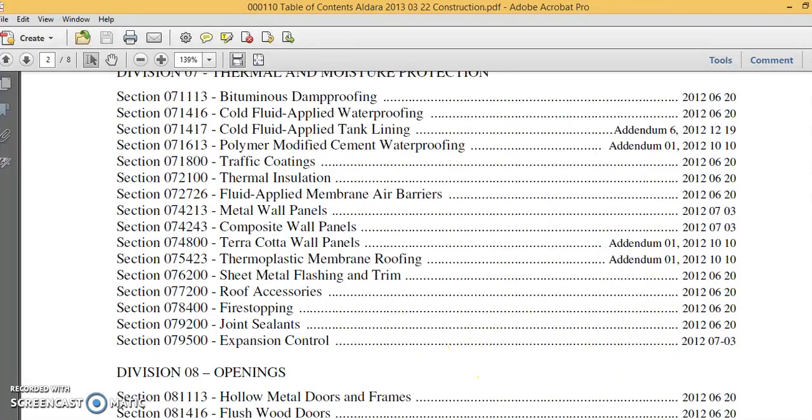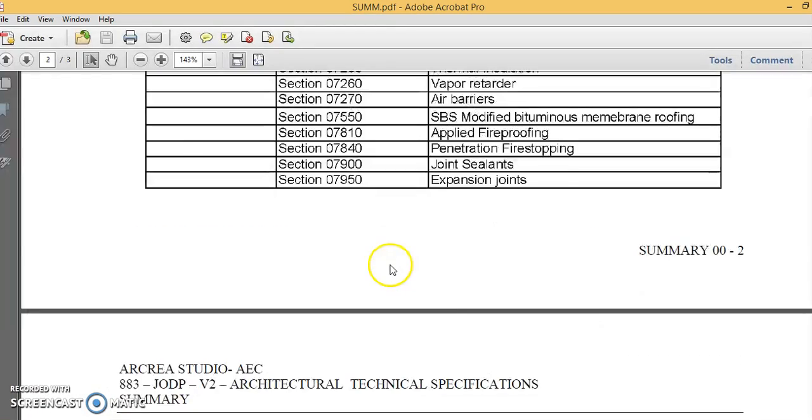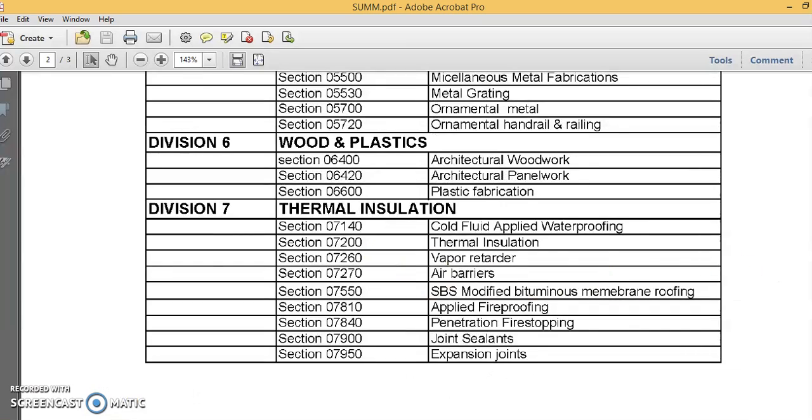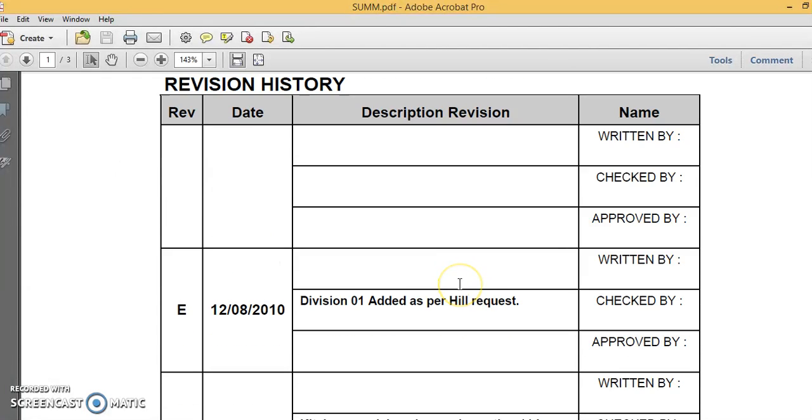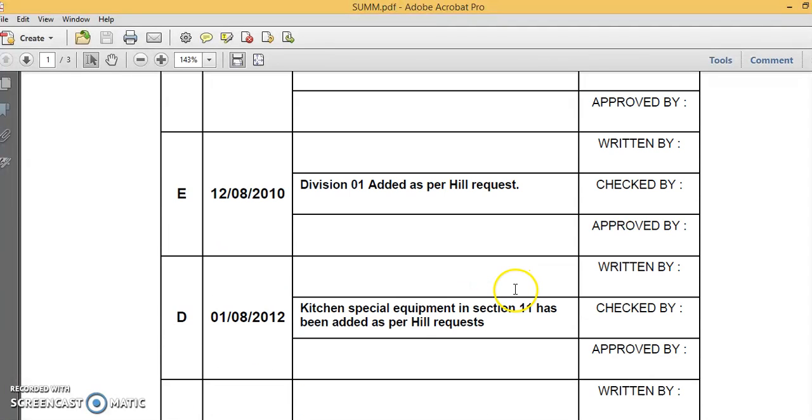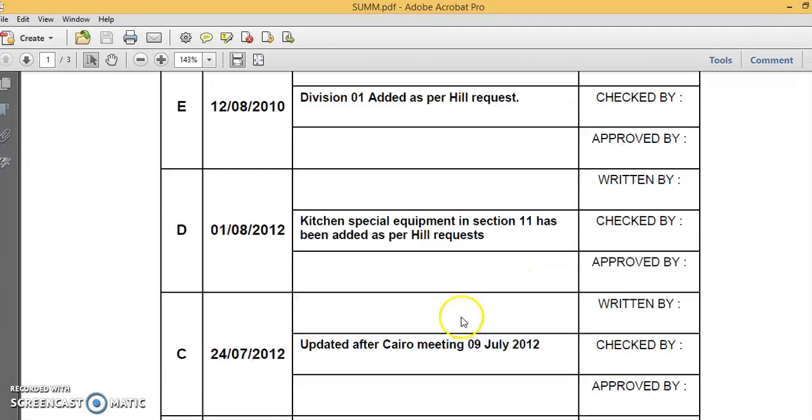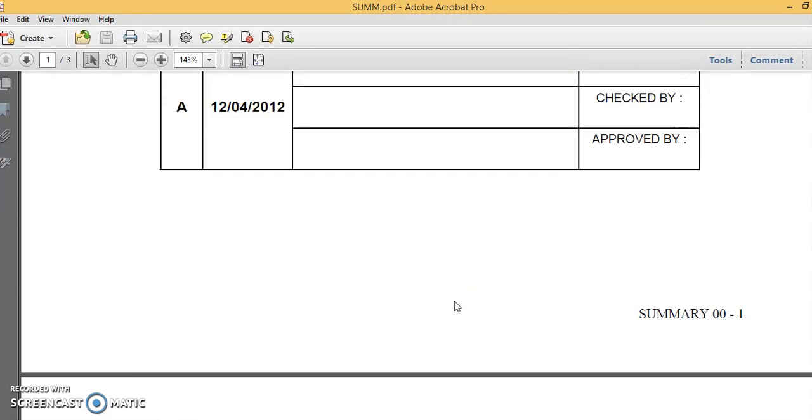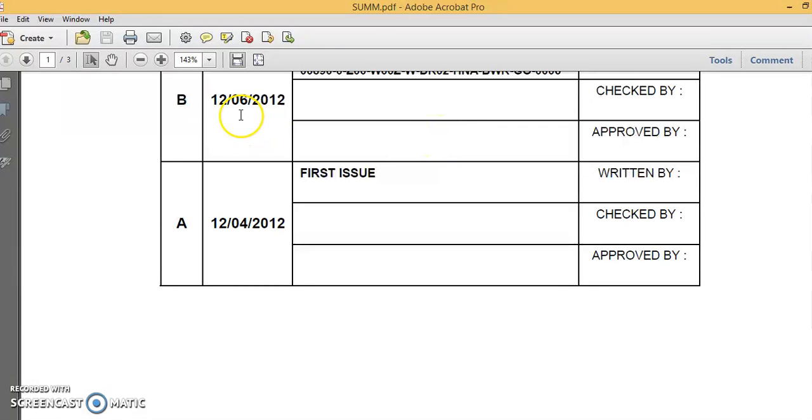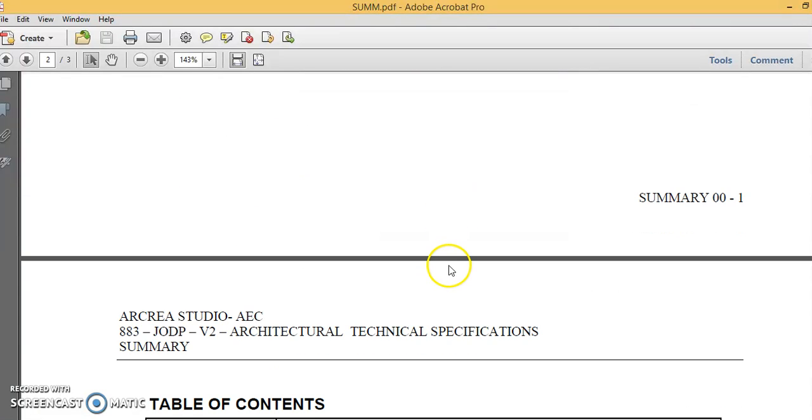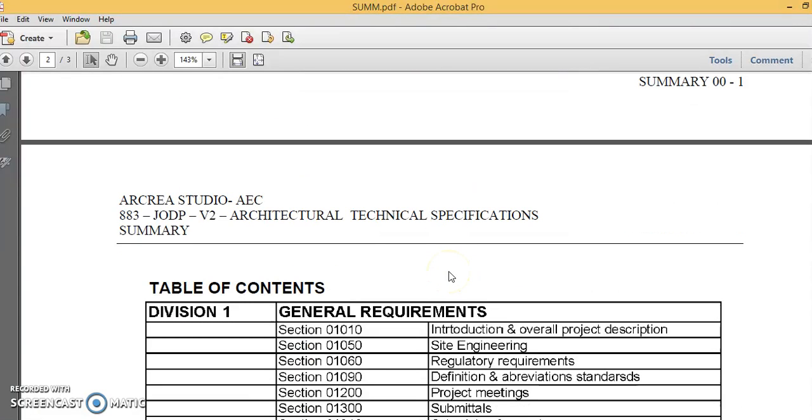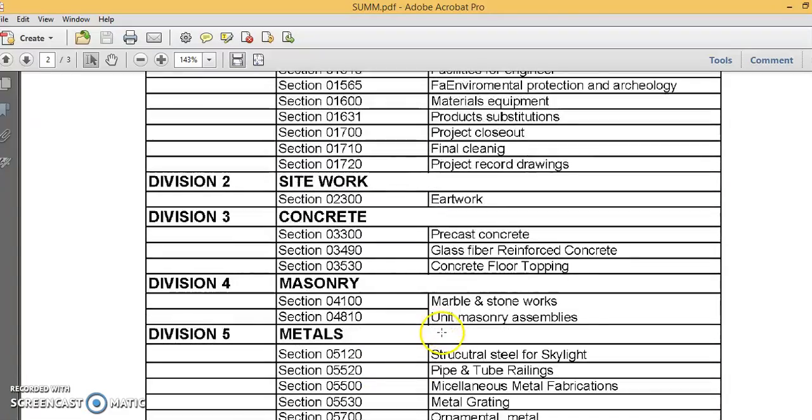Another example for addendums. Another project we are working on, I have seen a revision history: Division 1 added as per request, kitchen special equipment in section 11 has been added, and so on. Here is the first issue dated 12-04-2012, and as you see 12-06-12, there was some amendment also, but they haven't said if it's addendum or bulletin, and they have included all the sections which have been changed.